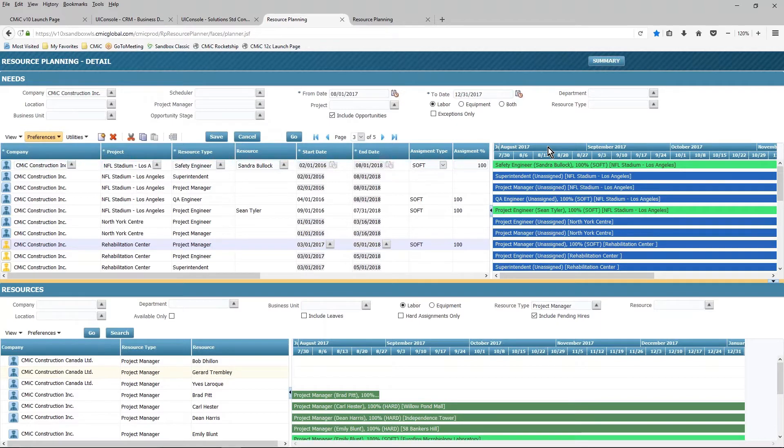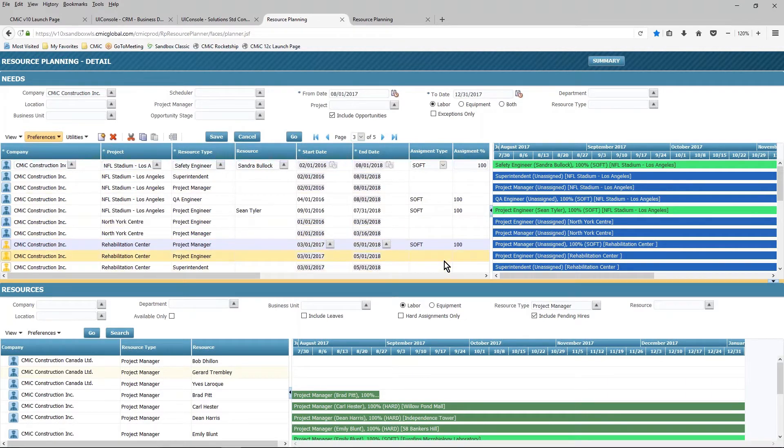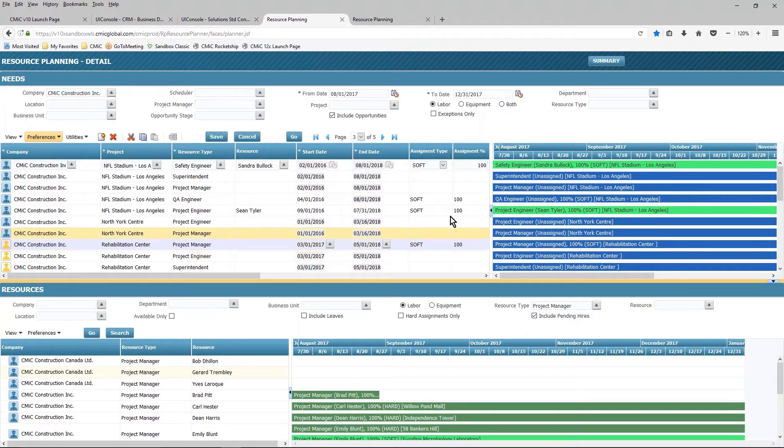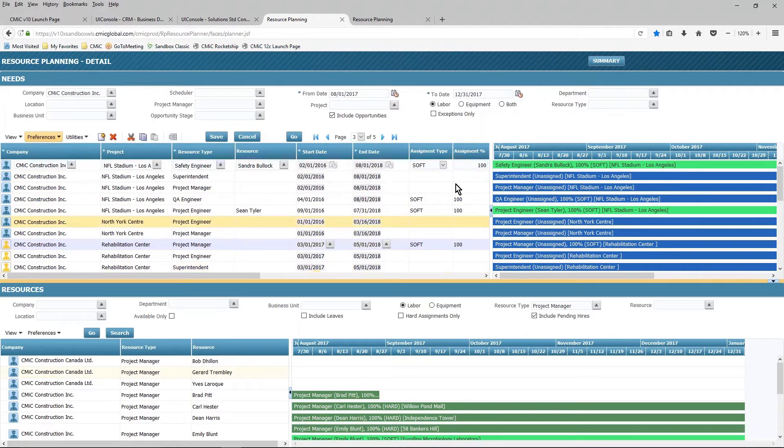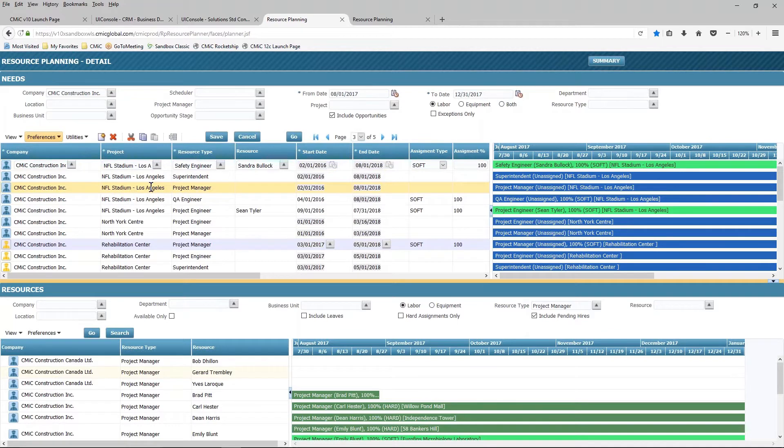In terms of planning my resources, I have the ability to either soft or hard allocate my resources, depending on where I am in terms of the planning process. If I wanted to lock something in place, I can go ahead and hard allocate it. I can also have control over the percentage allocation to that particular project for that resource.